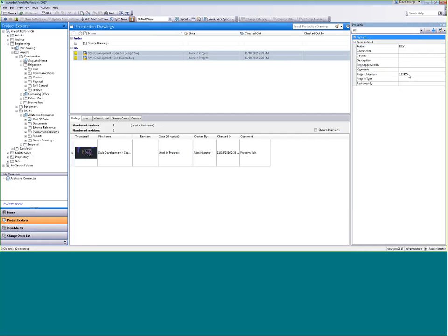It's very possible to set this up so that when you change the author, project number, county, sheet title, page number, or whatever else you have, it will automatically update the title blocks in your drawings. Imagine being able to change the revision number on a 300-page construction document set without opening up 300 drawings. You can come in here — very much like the Sheet Set Manager in AutoCAD — change the properties, and it will go update those 300 drawings for you.